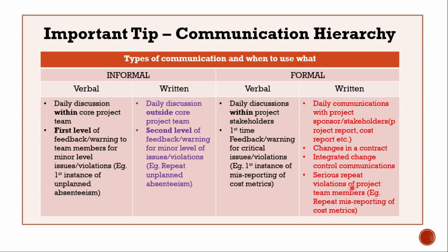Also remember, guys, whenever there are changes in contract, and whenever you have communications that deal with integrated change control processes, you always do a formal written communication. What you need to remember is this part, where it is very important to understand where formal communication is a must and necessary.